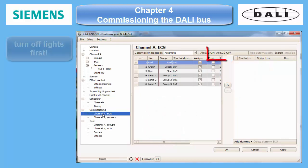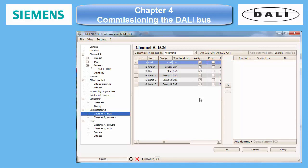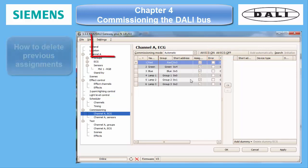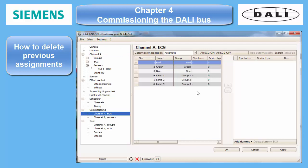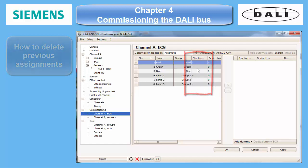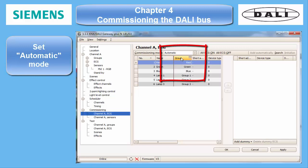If some of the lights are on, you must first turn them off using the All ECG Off button. If you have already made previous assignments and want to begin from scratch again, make sure to delete them using the settings key — reset current settings. It will remove all assignments between projected ECGs and short addresses in the currently open commissioning window. Make sure to have set the automatic commissioning mode.